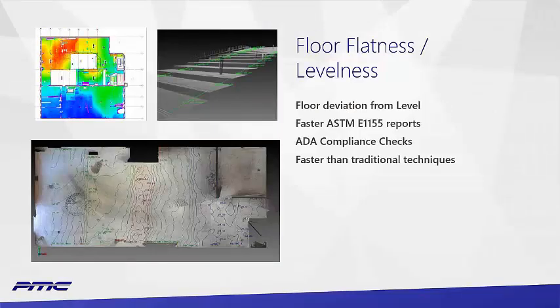Talked a little earlier about reports. This is one of them. A lot of work's been done in standard compliant floor flatness and levelness studies. There's specialized software out there. If you are in this business, you know what these terms mean. It produces automatic reports. They can save a ton of time. You don't need to be out there doing point surveys. This takes care of it all out of the point cloud, produces very good data sets and formal reports.